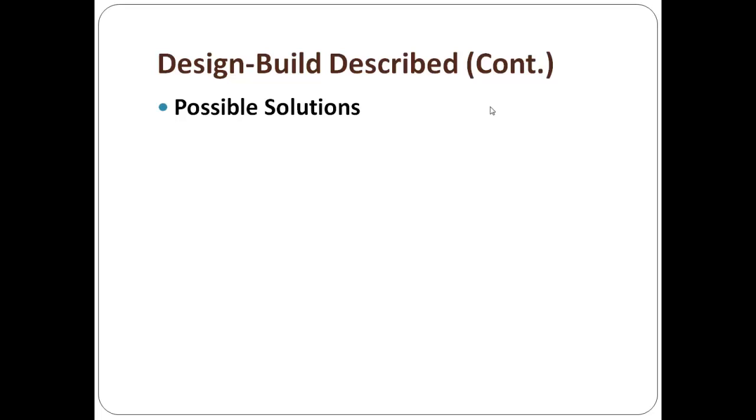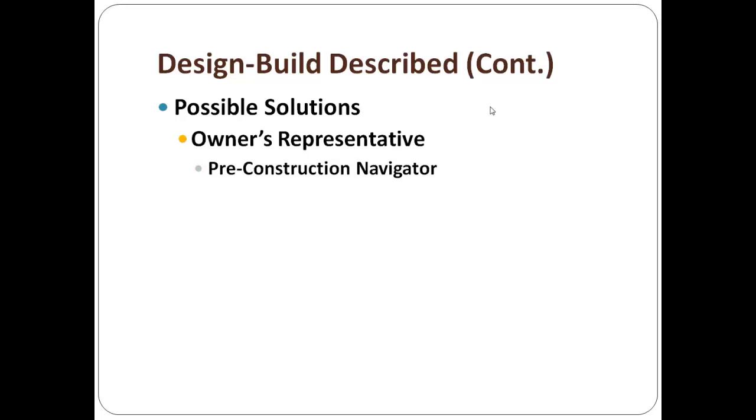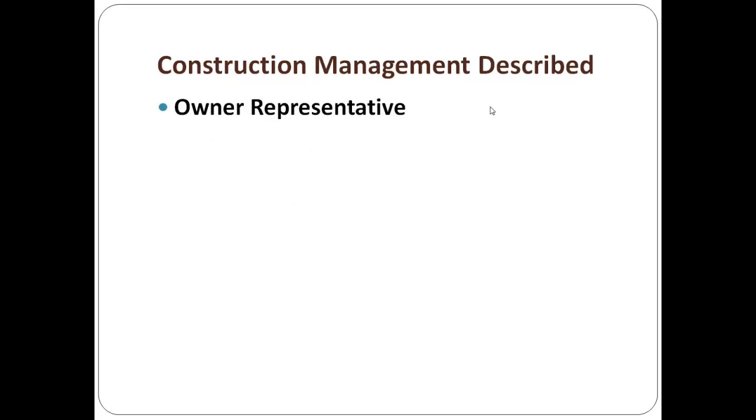So if you're going to use this and you want to avoid some of the perceived cons, negatives, disadvantages, you get an owner's representative to work with the design builder who understands construction, kind of like what I talked about, a navigator, project consultant, and a project manager who understands preparation, planning, and design, and also understands construction. So you've got a pre-construction navigator and a construction manager who goes in, and that's extra fees and extra money to make certain that you get the building that you want within the dollar amount. So it's really the quality and size, as opposed to it going over budget. Owner representative.